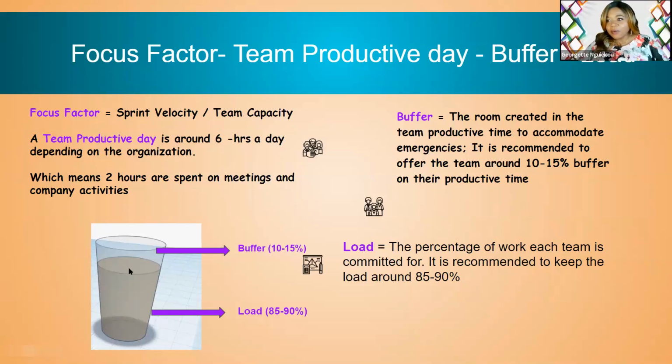Or I would prefer load. Why? Because when you put the load, it gives you exactly what you have to give to the developer. Or if you are reserving 10% buffer, that means you can give this guy up to 90% of his commitment. You can commit up to 90% of his time. Does that make sense? That is the difference between load and buffer.